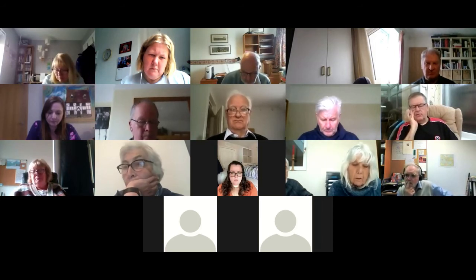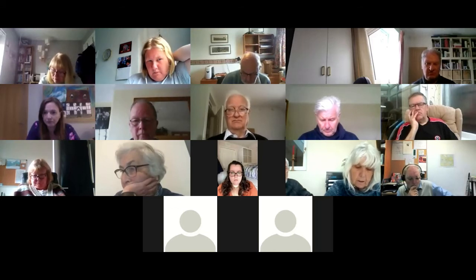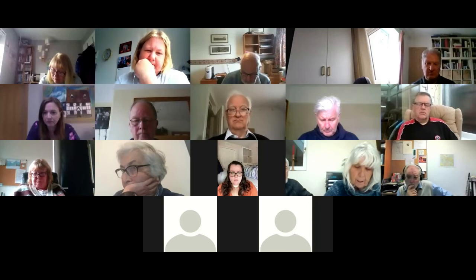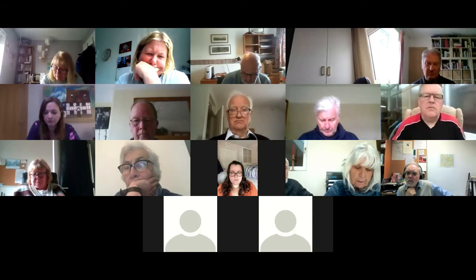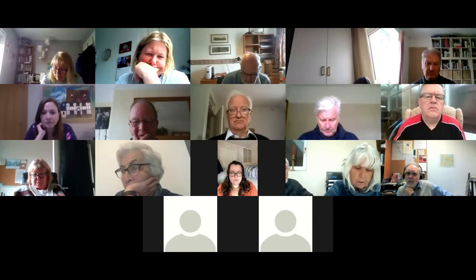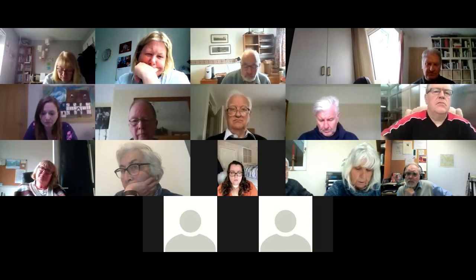They gave priority to the crack above the porch. They have cut back either side of the crack between the stones and put six stainless steel dowels across the crack, and this has been pointed with a monitor fitted across it. Also, the porch beneath the crack has been pointed up and sealed, and this will also have a monitor fixed. This is the main entrance to the church. So this is where we are today with the church building.